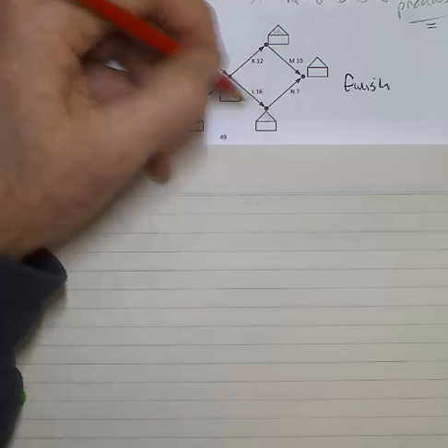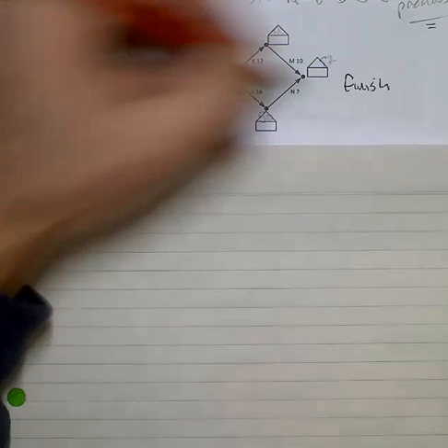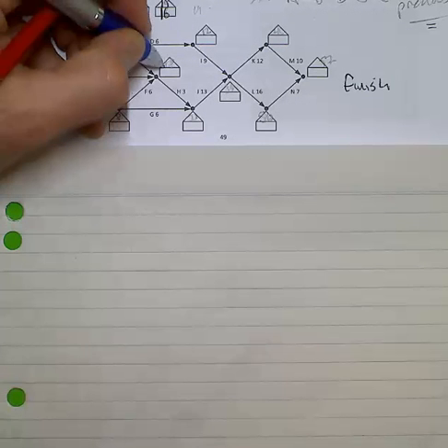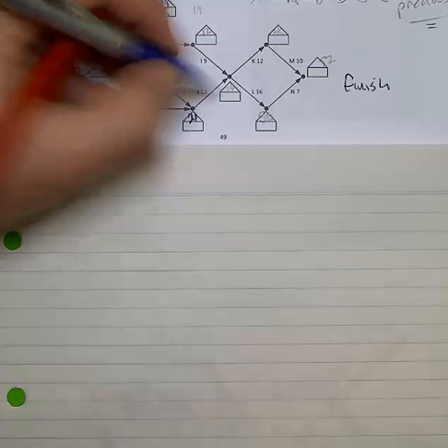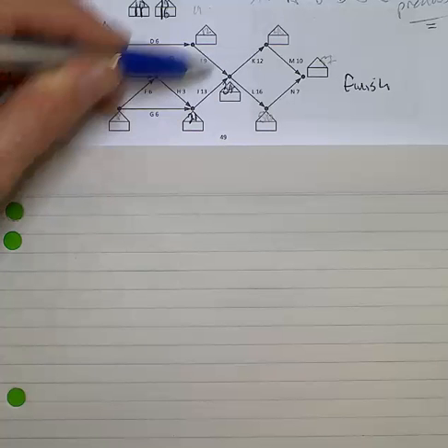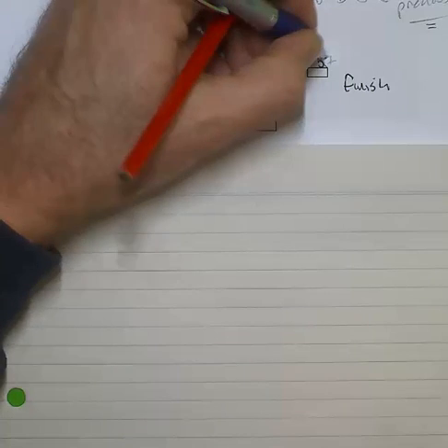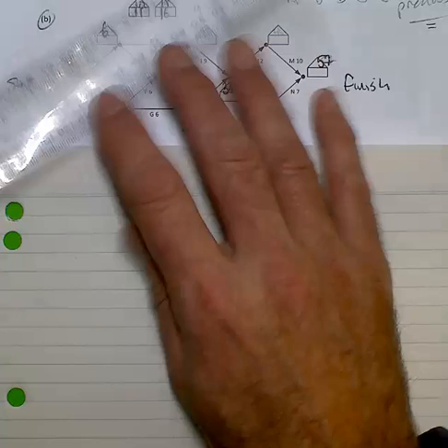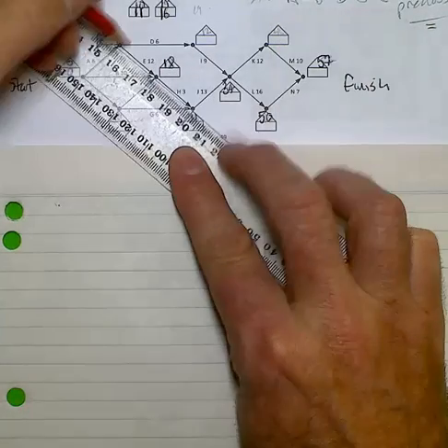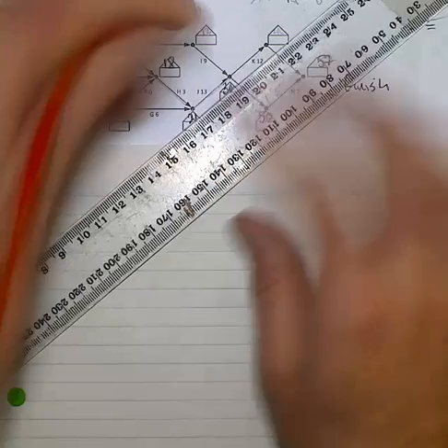Should just check that. It should be 50, sorry. 50, and that makes that 57. Now I think I now have the critical path. So A, E, H, J, L, and N, 57, will be the critical path. Mark that in. Write it down